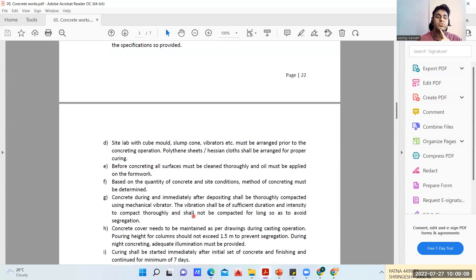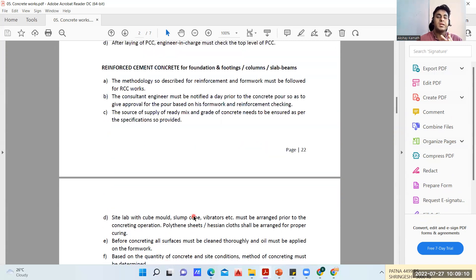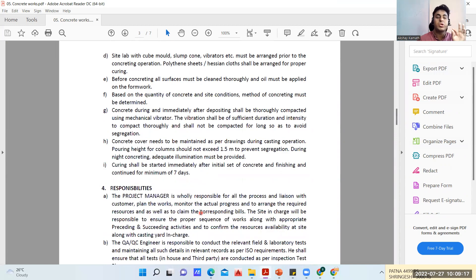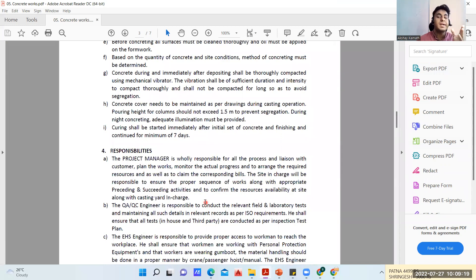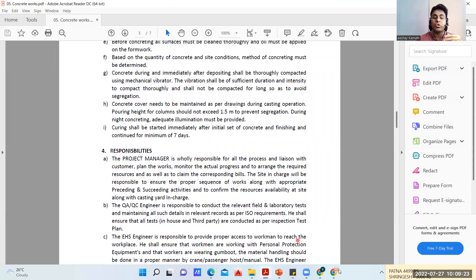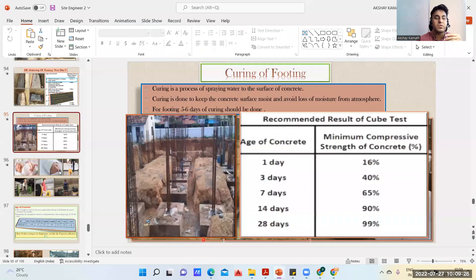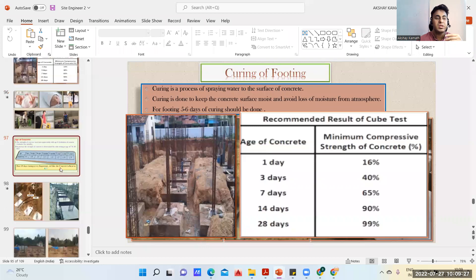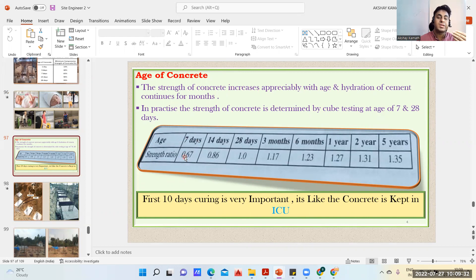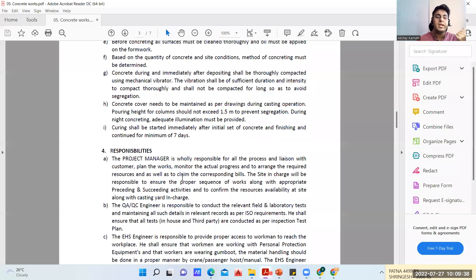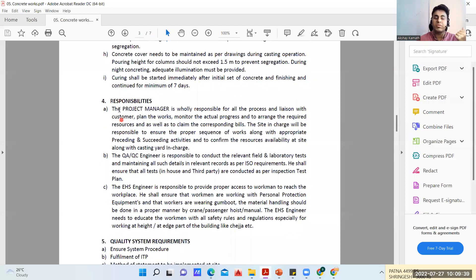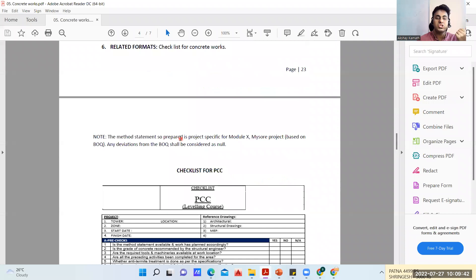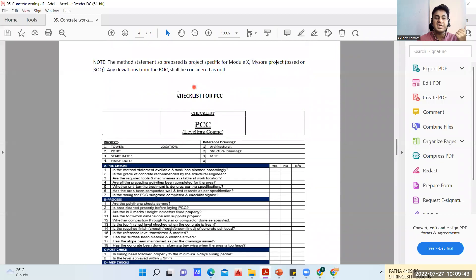Curing shall be started immediately after the initial set of concrete and finishing, and continued for minimum of seven days. Usually seven to ten days is a good time to do curing, irrespective of whether it is footing, slab, column or whatever. In the first seven to ten days your concrete is going to gain almost 67 to 70 percent of strength. You can see it here - in seven days almost 67 percent of strength will be gained. That is why the first seven days of curing is very important.